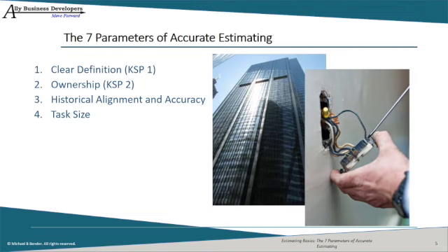When a team member is having difficulty estimating a task, one of the tricks I use to help them is to have them create a checklist of all the steps that they will have to do to complete the task. This generally does the trick and I get reliable estimates. This technique also helps identify misunderstandings regarding the scope of the activity. Essentially, it's creating a deeper work breakdown structure.